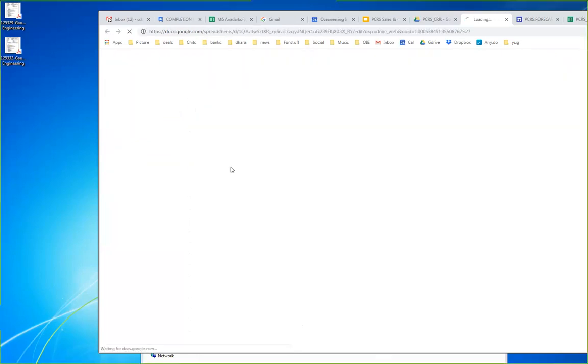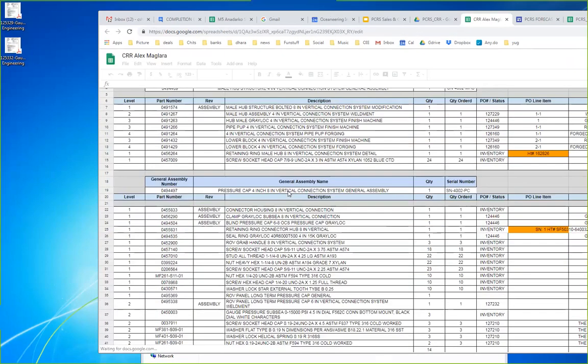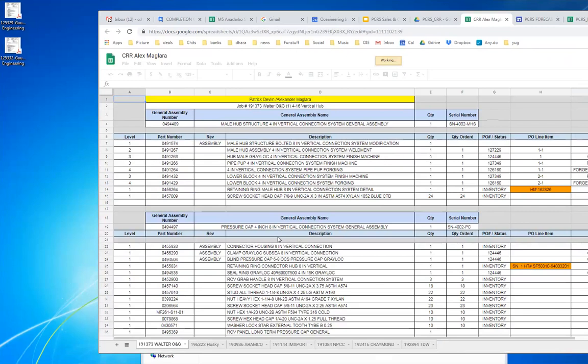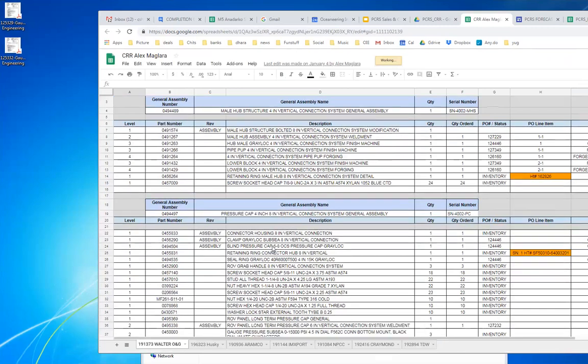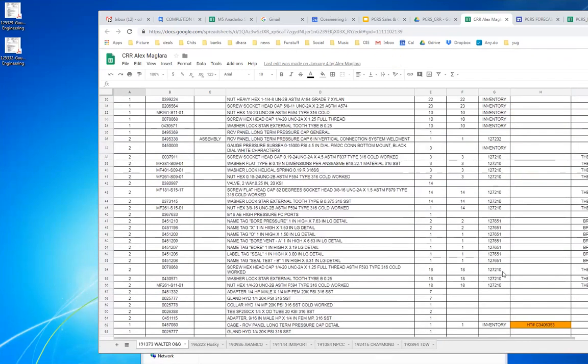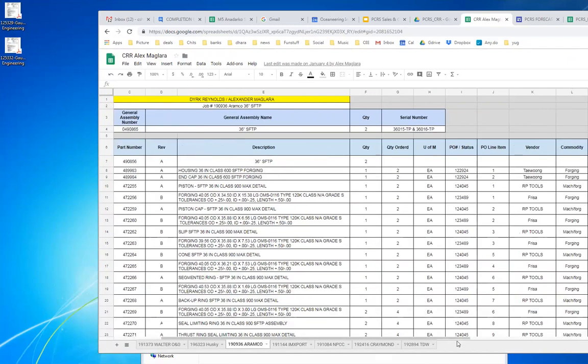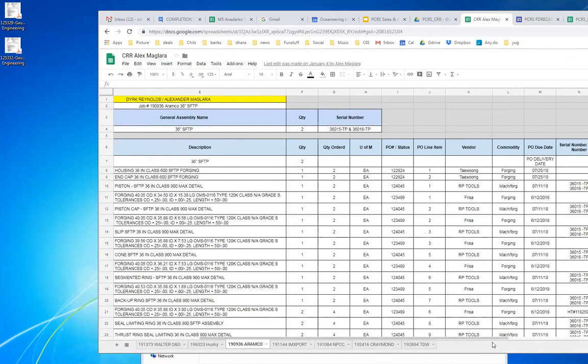So they have a component requirement report, or whenever there is a BOM generated, they'll copy that BOM over, and they'll say, these are all the parts I need to buy, and how many quantities, and then what POs they're buying or if they're getting from inventory. So they can keep track of when they're going to have all the parts to build. Right? So for each project, they'll go and build one, and they'll track who's building it, what PO line items, when they're coming, and all that.